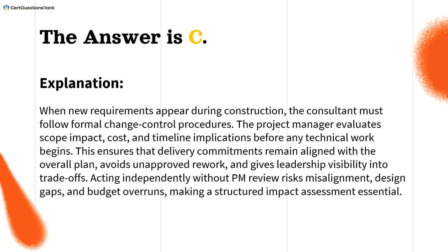The answer is C. When new requirements appear during construction, the consultant must follow formal change control procedures. The project manager evaluates scope impact, cost, and timeline implications before any technical work begins.